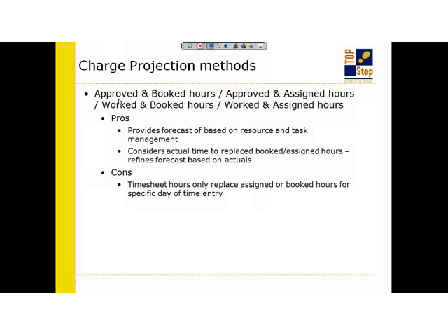Okay. But it replaces it day by day. So I put 10 on one day and 5 on another. The 8 hours for Monday gets replaced by 10. The 8 hours for Tuesday gets replaced by 5. Okay, so my forecast actually goes from 16 down to 15, which is correct.